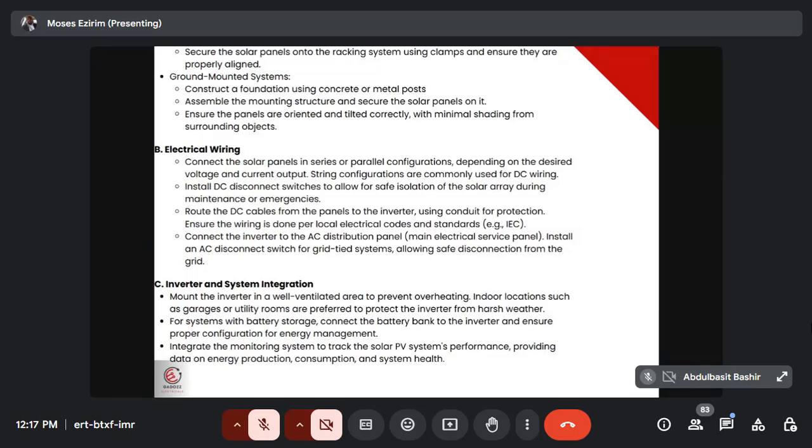All right. Using your tape rule to do your measurements, all those are old school. Let me tell you, nobody does that for large installation. It is when you are doing a mini grid that you start using a tape rule to do your measurements. But when it comes to large installation, you don't use a tape rule. Strictly go there with your coordinates.